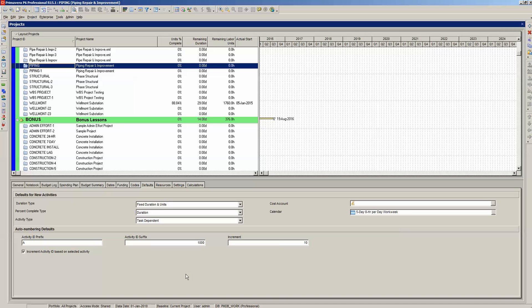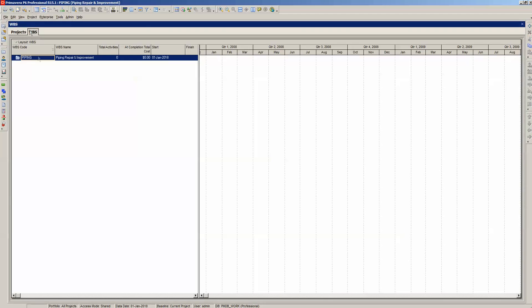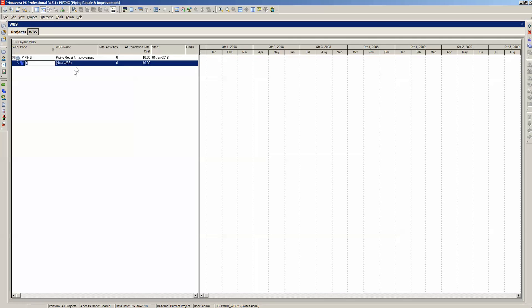We have here our piping project listed in the Enterprise Project Structure System in P6. We highlight our project and select Project WBS from the top drop-down menu. This opens up the WBS tab. Highlight the piping WBS code at the top and select Edit plus Add in the top drop-down menu. This creates a new WBS element that is a child of piping. Note that the WBS code is selected — do not change this WBS code because P6 automatically generates this value.